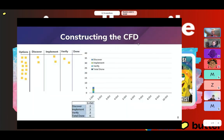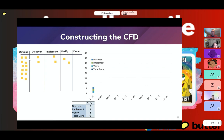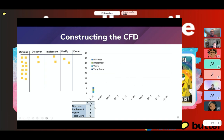I'm going to start by taking small steps in understanding how the CFD is constructed, kind of behind the scenes. I've got three different ways of looking at the same data. As you can see, I have two work items in discover, two in implement, two in verify, and one in done. Everything after the double line is an indication that we have begun working on this piece of work with the intention of finishing it and moving it to done.